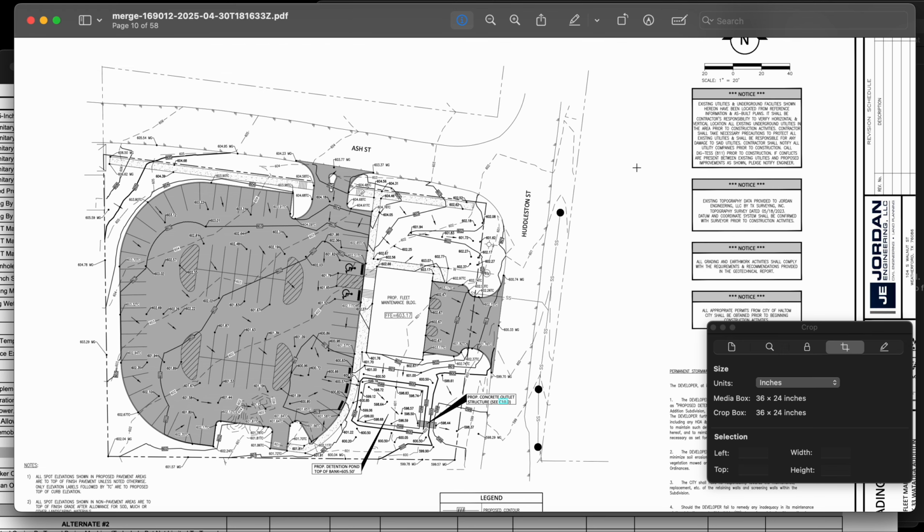So $20,000 add alternative if they want us to export out the soil. And the reason why I say 50 loads is because if you reach 50 loads and you're done, and there's still some soil, you're done. Your part of your scope of work is done. Compared to, let's say, 2,500 cubic yards.